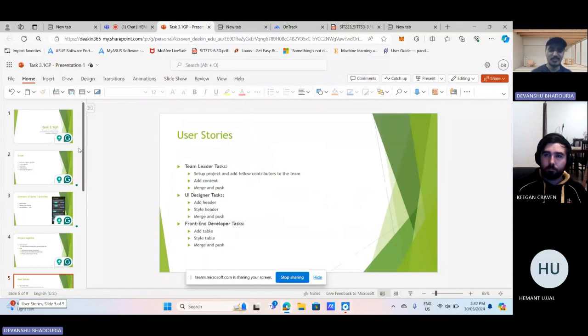Yeah, I also think the 3 points are more than enough, because you need to change the CSS files, and then you need to create some folders where you need to store the logo and appropriately place it in the page. So I think 3 points are fine for that.